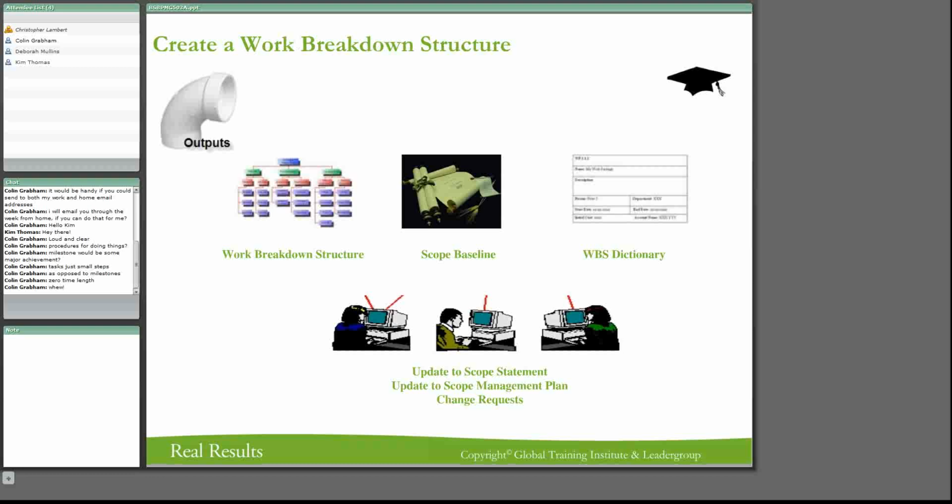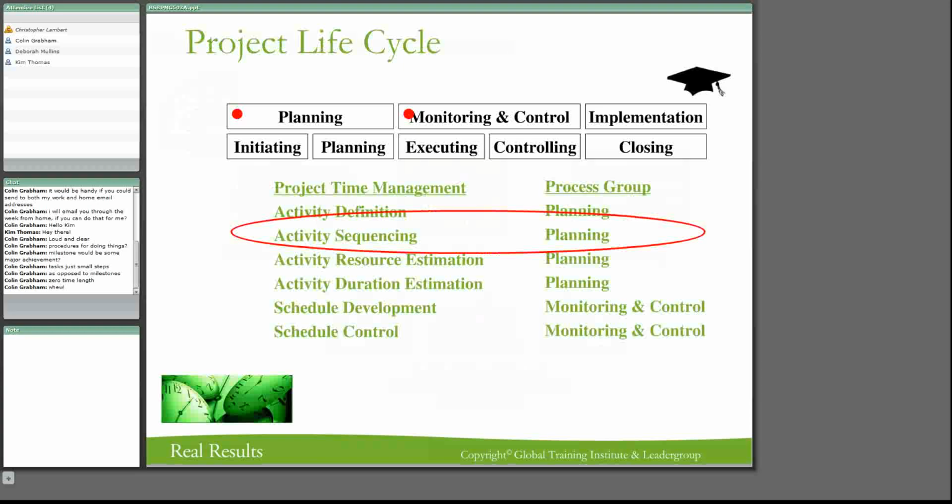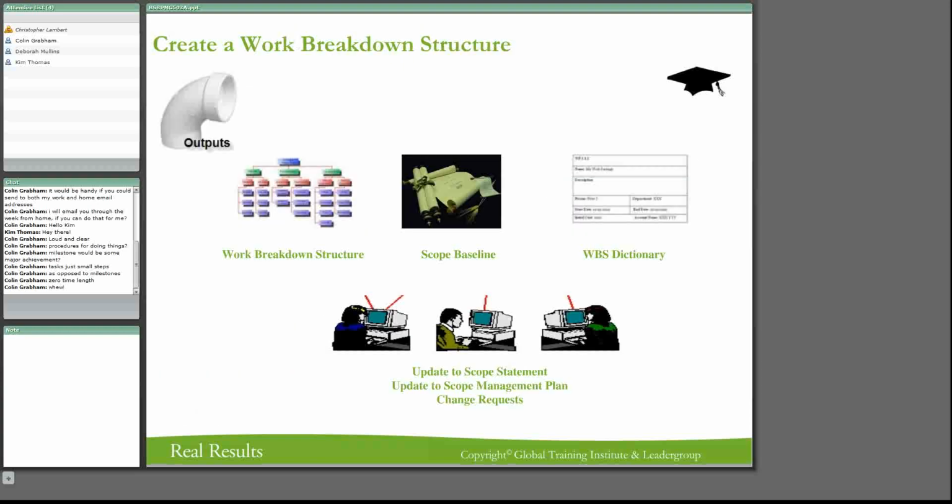Another tool that we actually have, and I'll get into the tools now. Another tool that we have here is what we might call rolling wave planning. Now, I've used this a couple of times, and that is because it's sometimes difficult to actually get all those activities in the first part. If we planned everything up front, we sometimes can't go into the detail enough because we don't know what's going to happen in the future.